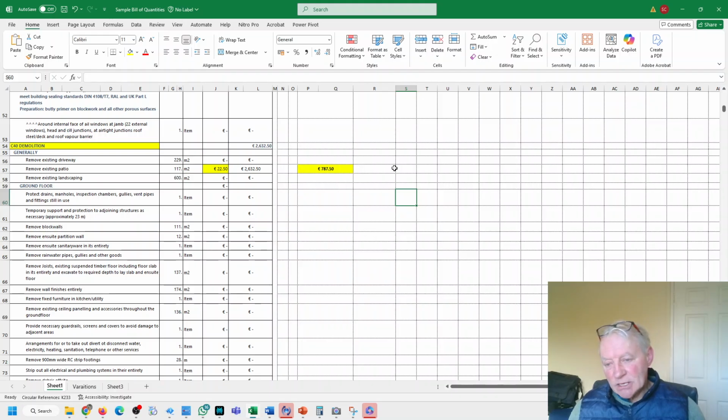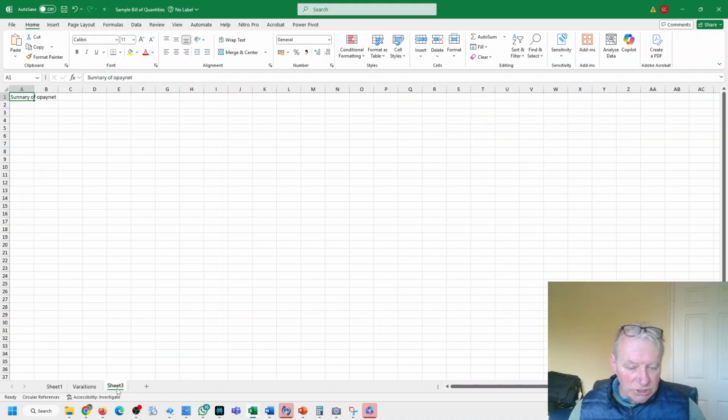We get a tender back, and then we can do a tender analysis because they've all filled out the same thing. Then we've got cost certainty to a certain degree. Then we've got traceability because of the variations. And then we can also come down and change it in the tab and take this information down to final. So it's interwoven information that cross-pollinates itself, and it needs to be done.